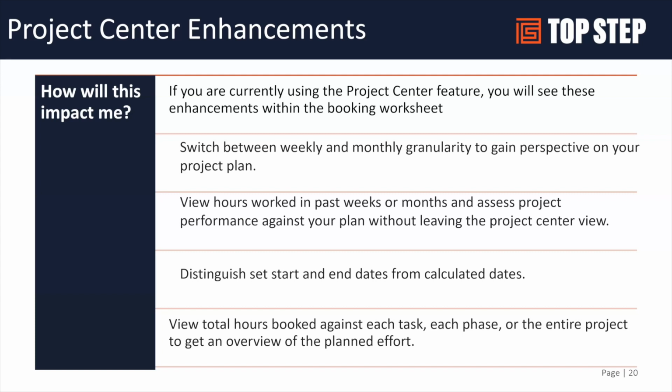Being able to see the hours in the past, weeks or months, and assess your performance without having to leave the project center. So you don't have to run a report. You can actually see where you are, the hours you've spent, the planned hours, your EAC, your ETC, which is really nice without having to navigate outside the project. You can distinguish better your start and end dates from the calculated end dates. One of the Project Center features is you can have the project center drive your end dates within your project tasks. So using the earliest start and latest end can drive the dates within your project plan.